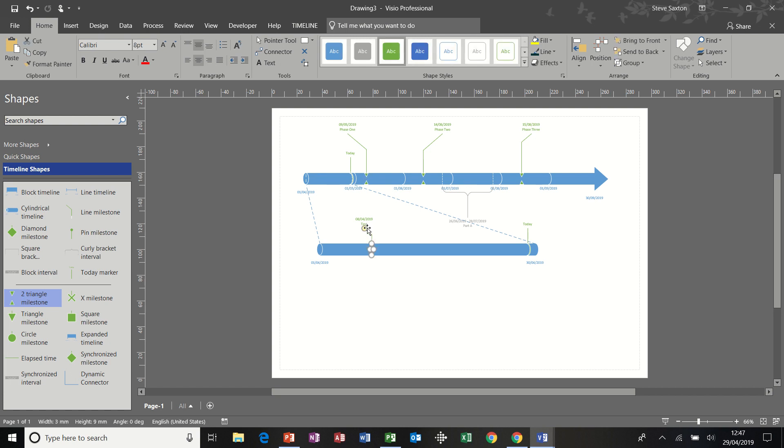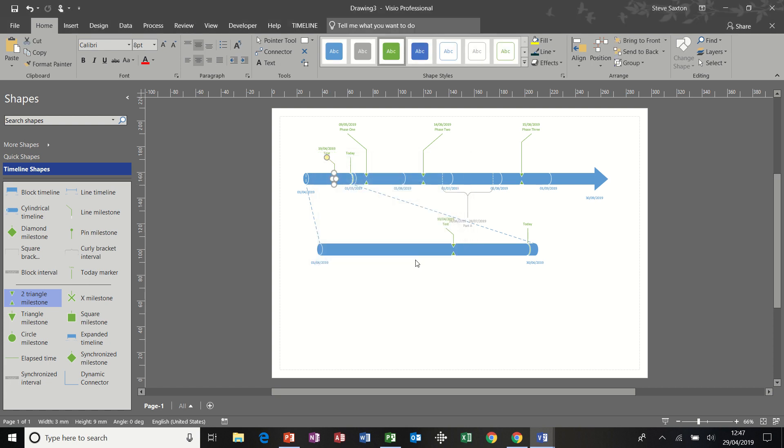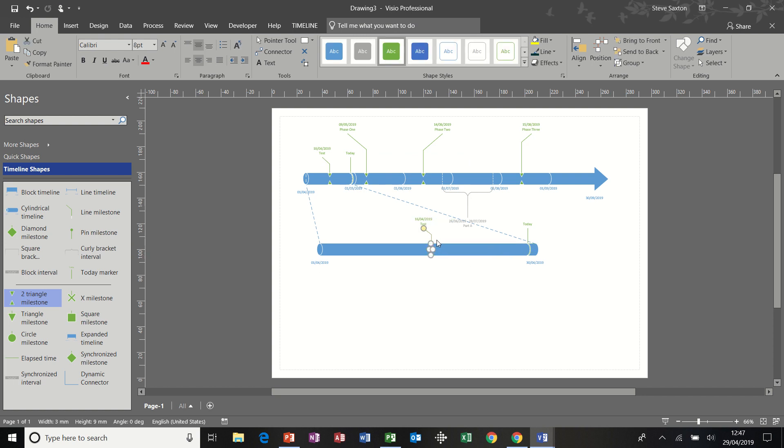If I delete that and do the same again, this time do it on the main timeline. But I'll do it within that time period. I'll call it test again. Click OK. It appears on both the main timeline and the expanded timeline. And when I move these around, as you can see, it's affecting the other one.